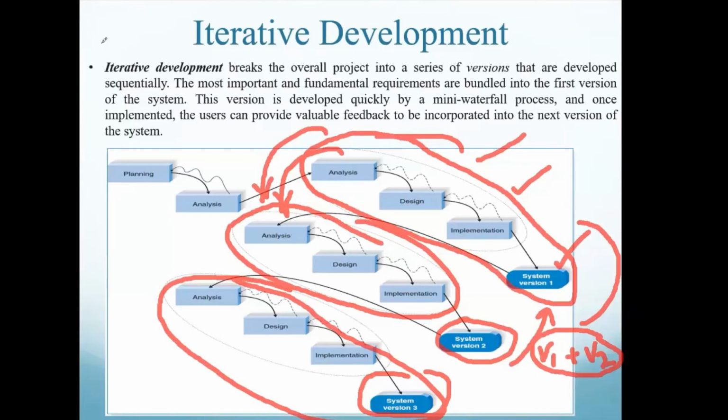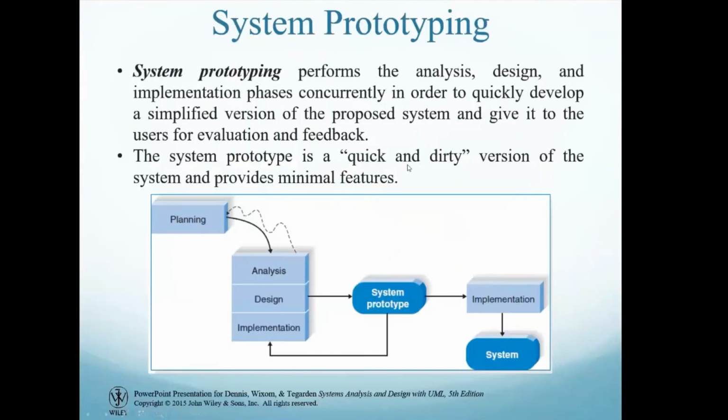Okay, so the next methodology is system prototyping. There are two types of prototyping. One is called system prototyping. System prototyping means that before developing the actual system, you design a prototype. A prototype is an incomplete system, but it is a system, not document papers. In the previous methodologies, most of the work before is on papers, but this one, you design one prototype first. One dummy type of system first, and then show the business, you see, you want a system like this. Then when the business people or the organization people look at the system, they can quickly decide, because the system is already there.